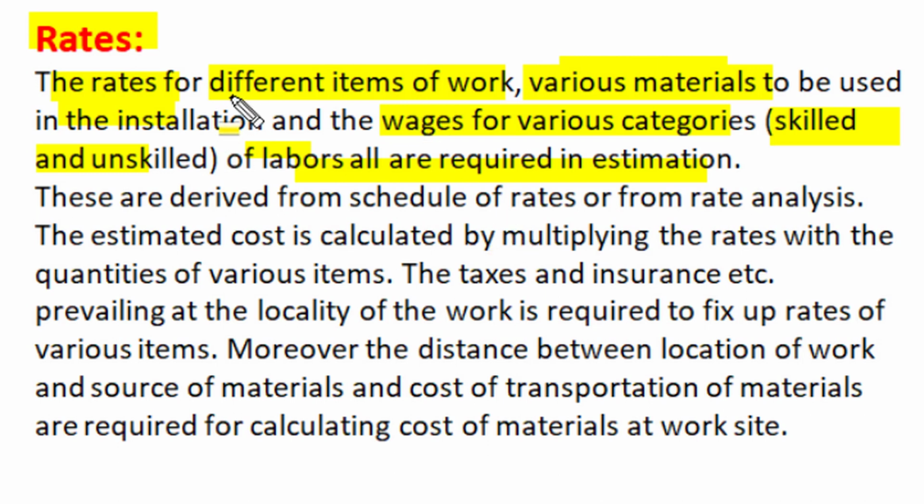Now these rates are generally derived from schedule of rates of some standard organization, and those rates are connected to specification of work and material to be used. Sometimes the rates are obtained by rate analysis or market survey. Now the estimated cost of project is obtained by multiplying the rates with the quantity of various items, and in these rates we add taxes, insurances prevailing at the locality of work.